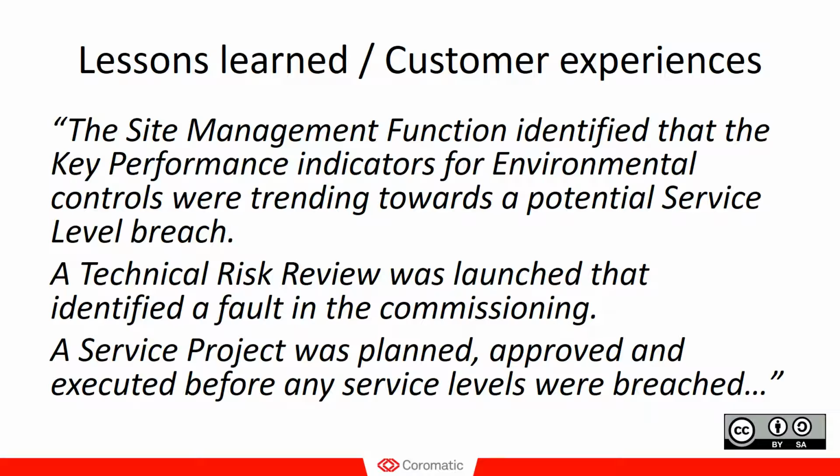What they found out was that there was a fault in the commissioning. It had been approved and had compliance certificates and everything in place, but it was a technical mistake that had been missed during the commissioning. So a service project was planned, approved and executed on site without any problems, and it was completed before any service levels actually were breached.